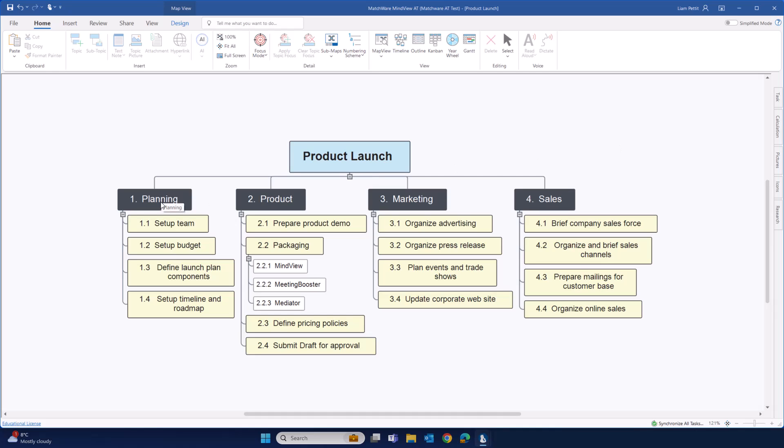The main deliverables of planning, product, marketing and sales will be automatically scheduled in the Gantt chart, rolling up the tasks beneath it to summarize the deliverable above.